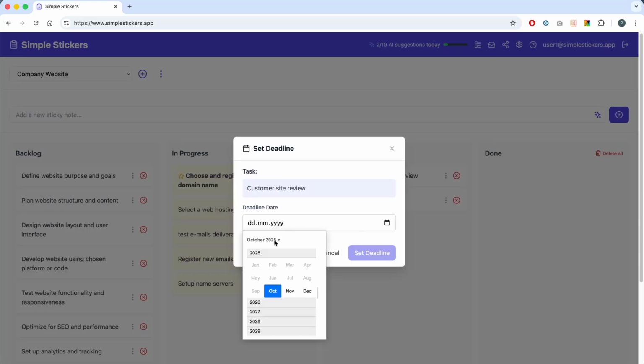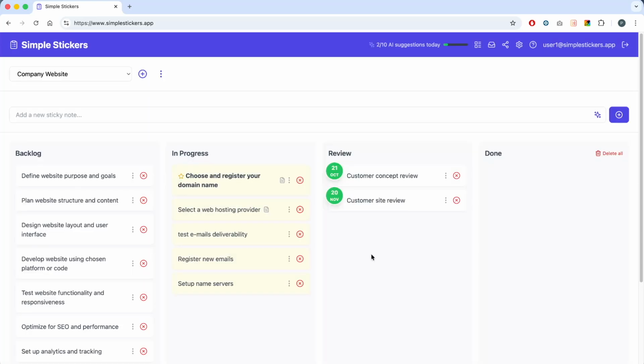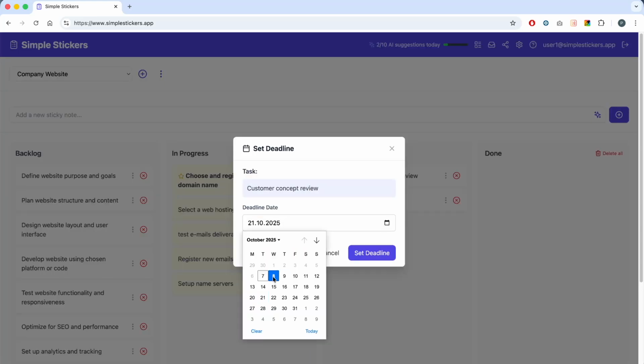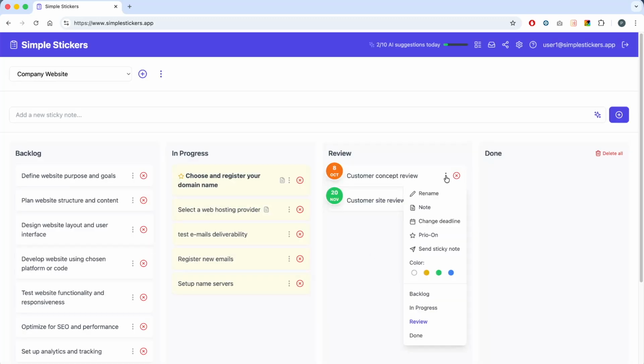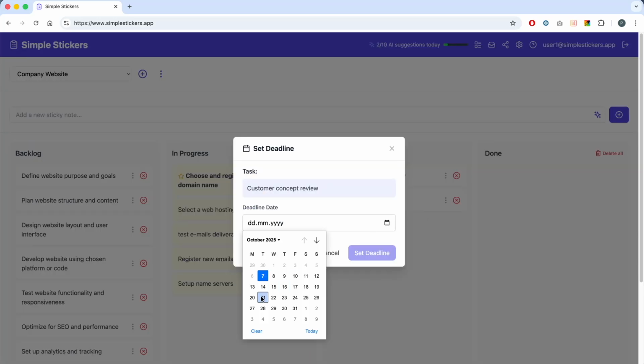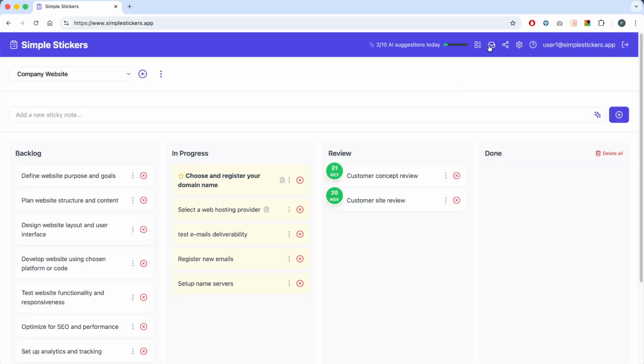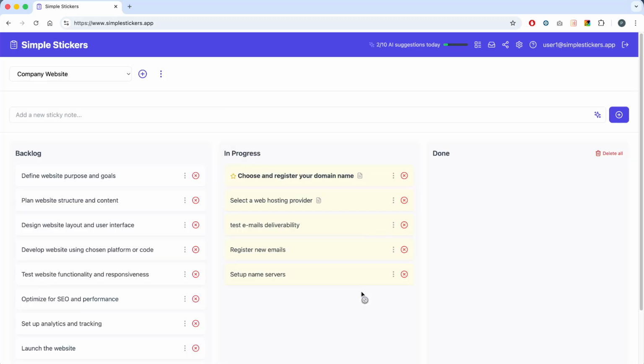Distant milestones always have a green background. If the date is tomorrow, the milestone will be orange, and today's or earlier date already shows red. This helps us immediately identify approaching deadlines. We usually remember the nearest milestone, so we can hide them and check any time as needed.